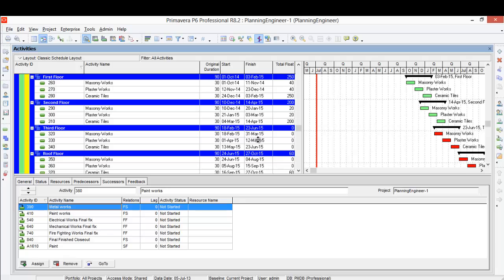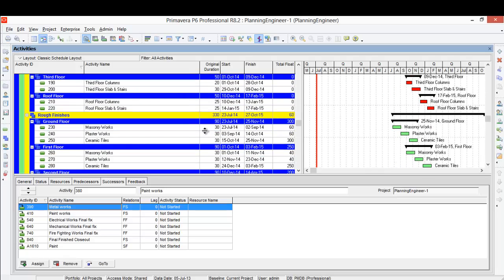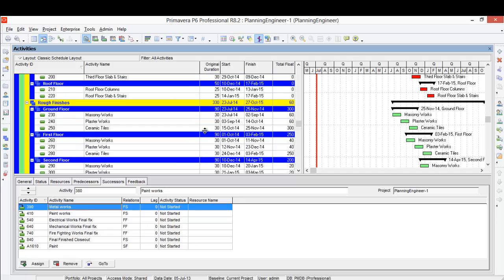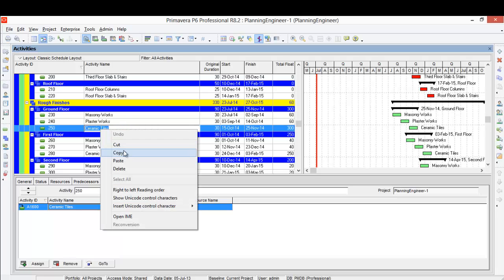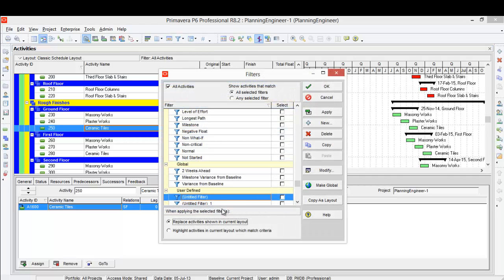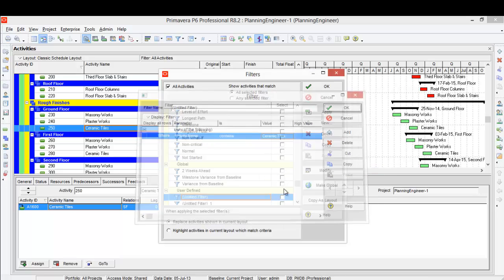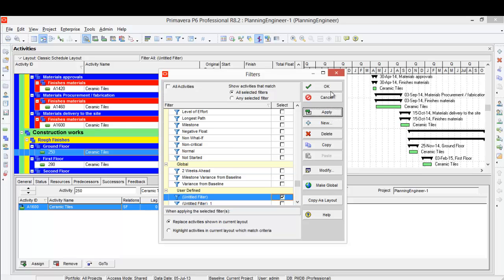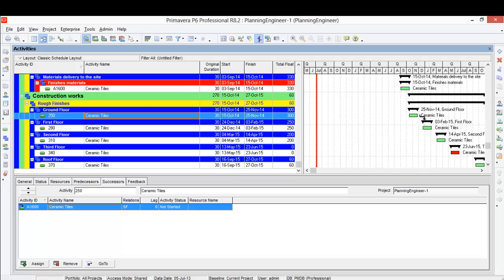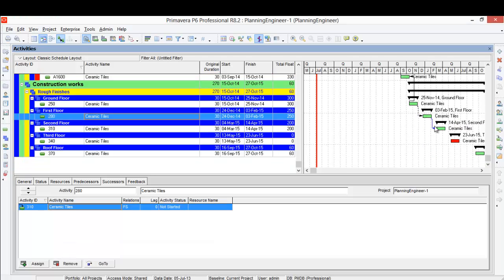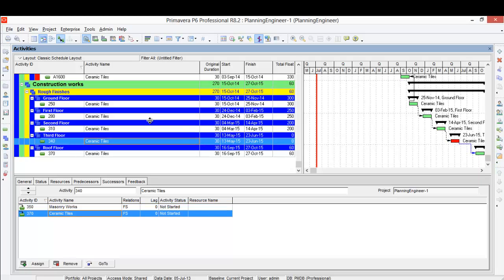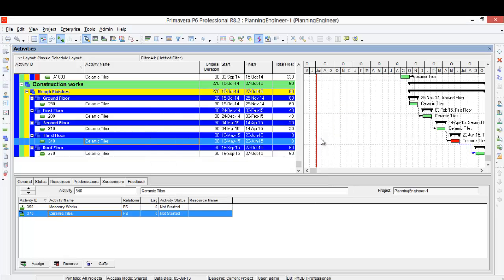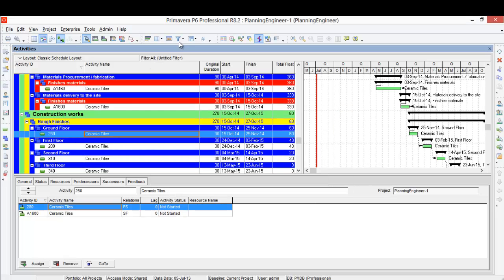Okay, so now everything seems to be fine. We have here ceramic tiles 300 days which is not reasonable of course. So make filter on the ceramic tiles. And we'll do the same relationship, finish to start. And let's run the program. And now we fixed the floats here.